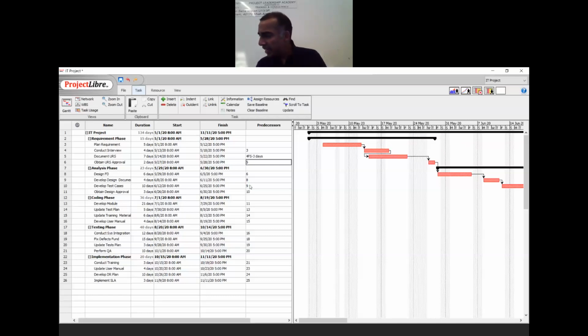Next lead and lag that I would like to do is under develop test cases, item number 9. So let's do this. I would like item number 10 to start the same date as item number 9. So what I do is I'll say when 9 starts, then this one will start as well.